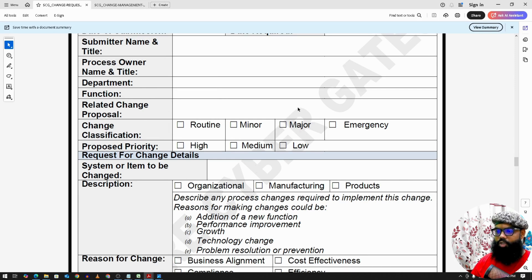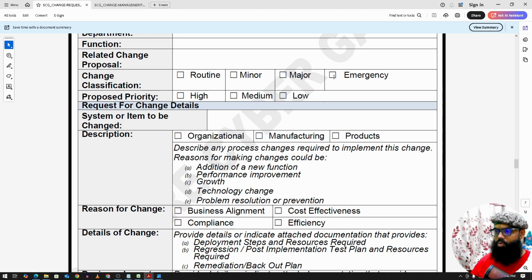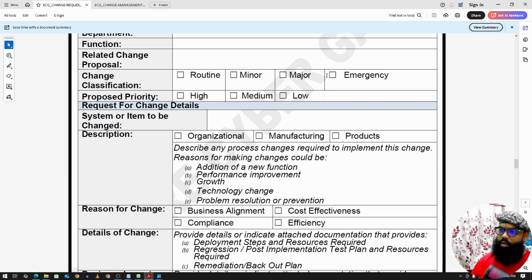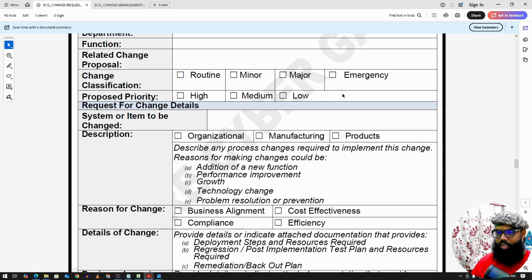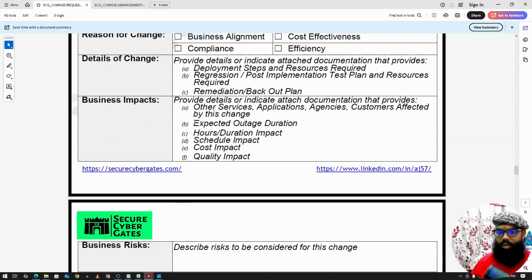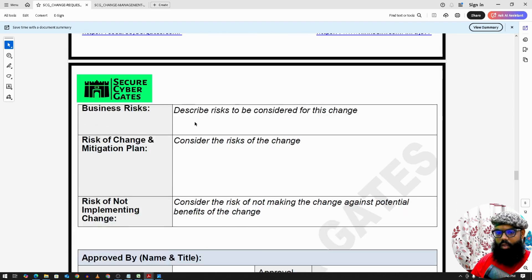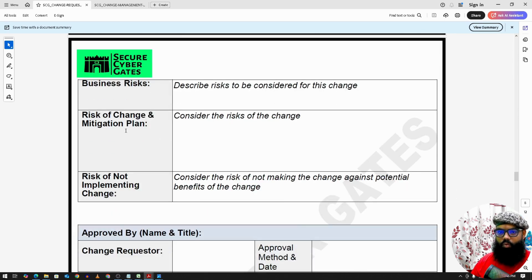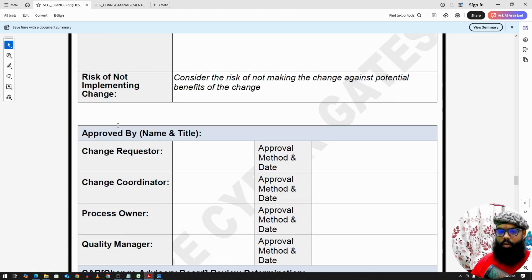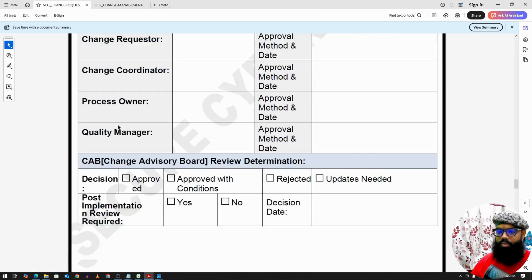The form captures whether the change is a major, minor, or emergency change. For example, an emergency change may arise when a vulnerability is exposing client or customer information that needs to be fixed urgently in production. Additional fields include business rationale, business risk, and any security risks associated with the change.